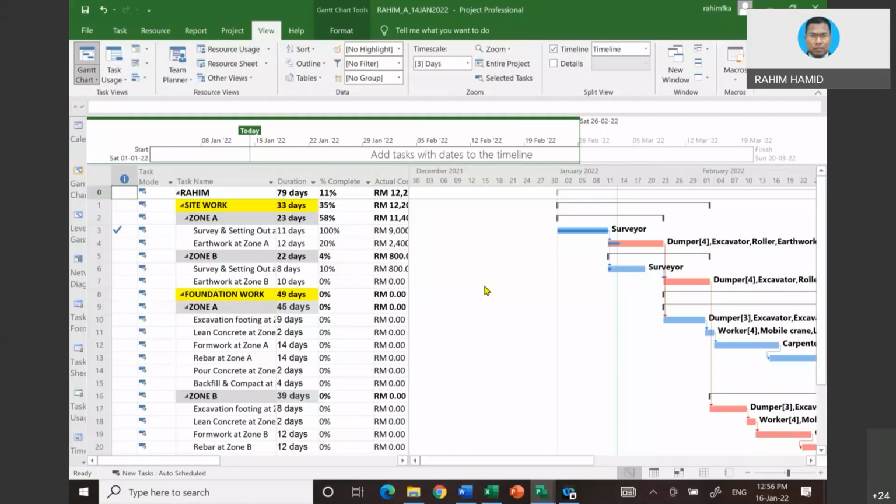We just arrange them that way. But once we already have the bar chart, you can just draw the resource histogram below the bar chart. You draw the vertical lines downward, then draw the resource histogram based on duration versus quantity. Then you can see it is a bit faster. Okay, I got it. Thank you.